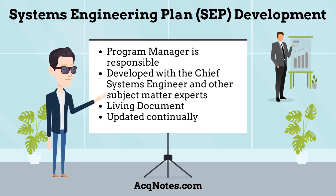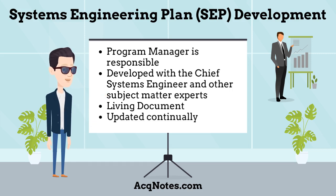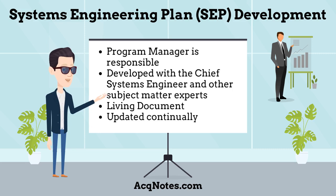How is a Systems Engineering Plan developed? The program manager is responsible for the development of the SEP. The SEP should be developed with the chief systems engineer and other subject matter experts. The document is considered a living document and is updated continually throughout a program.